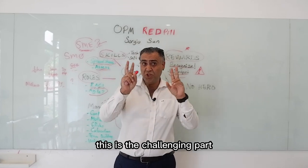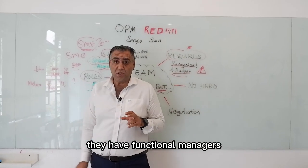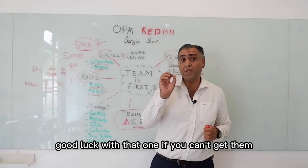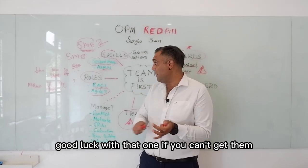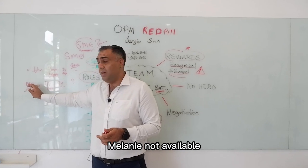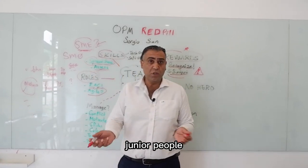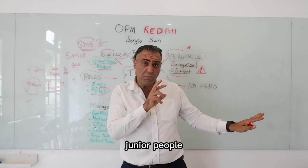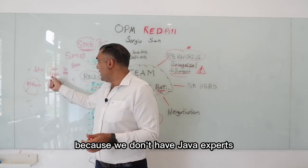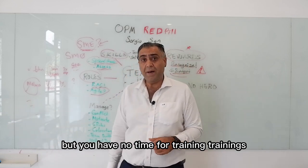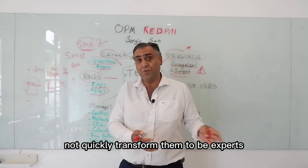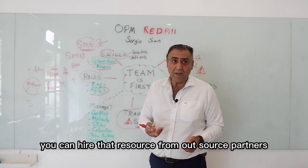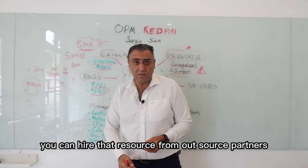Check with the functional manager — this is the challenging part. They have functional managers and you want those people for your project, but they may be busy. Negotiate with functional managers — good luck with that. If you can't get them — John not available, Melanie not available — you have two options: train junior or less experienced people, or outsource and hire that resource from an outsource partner temporarily.